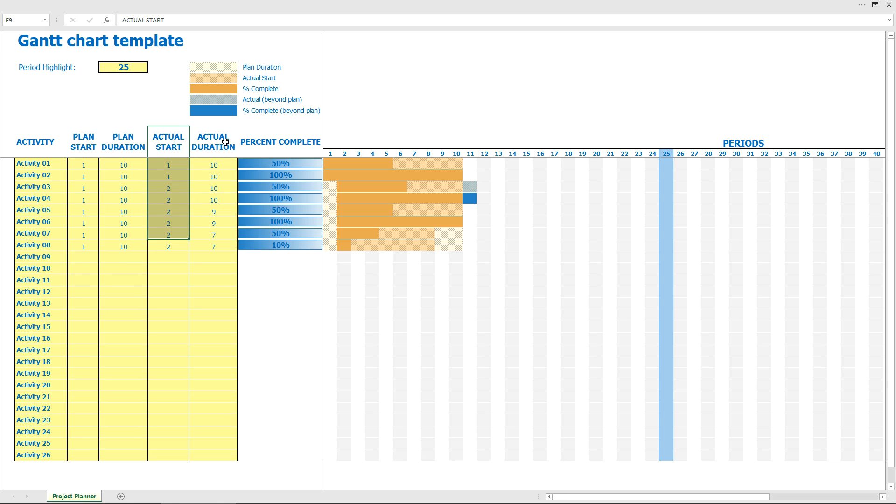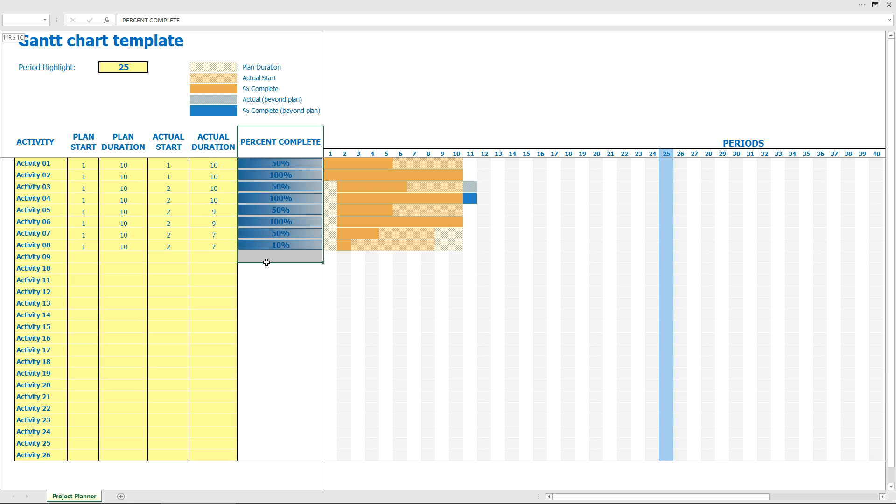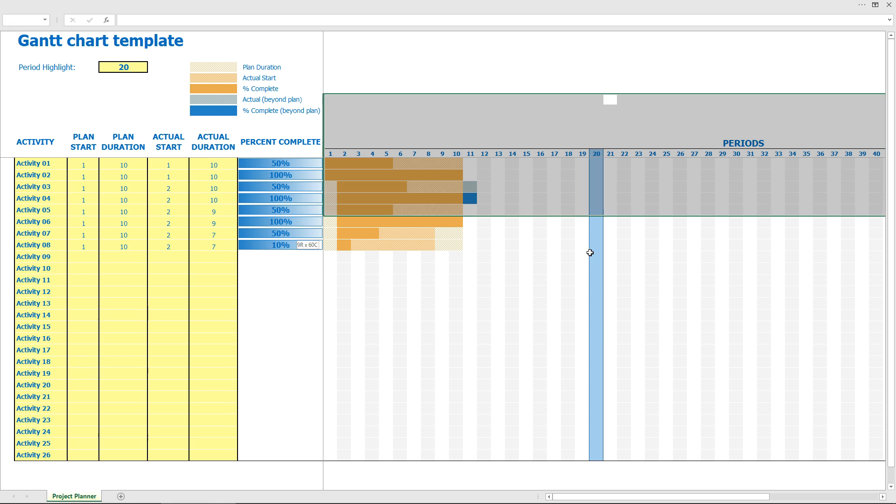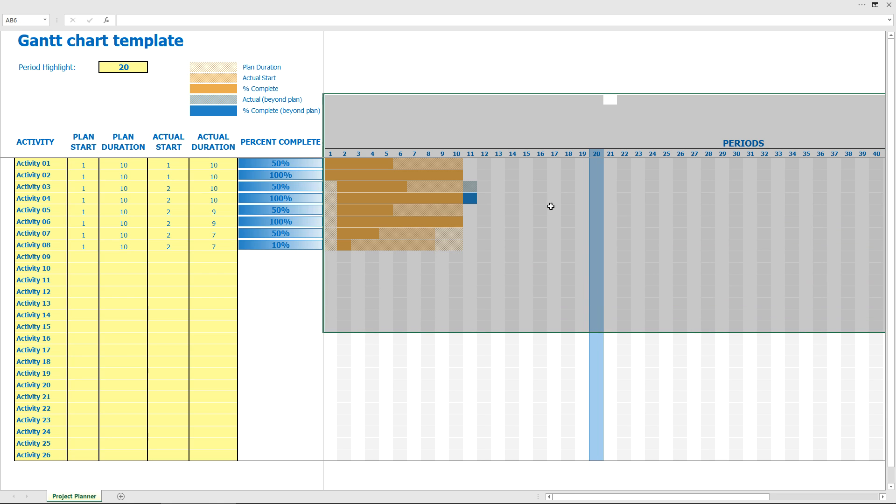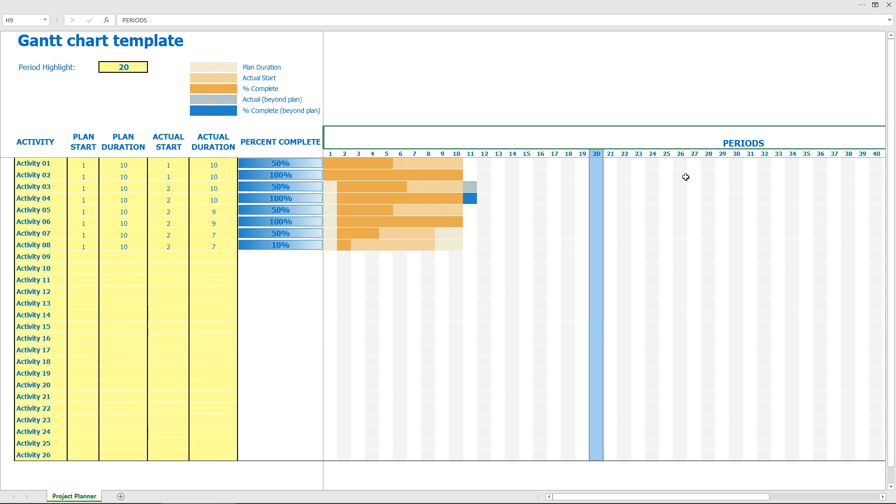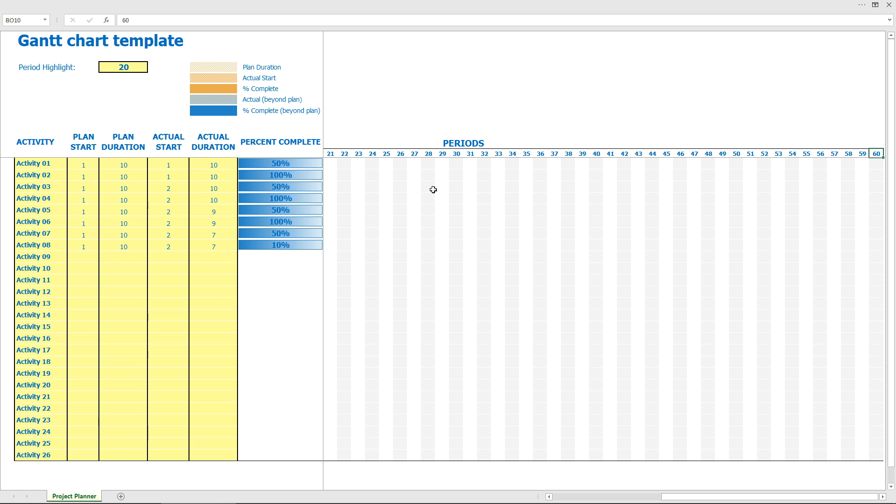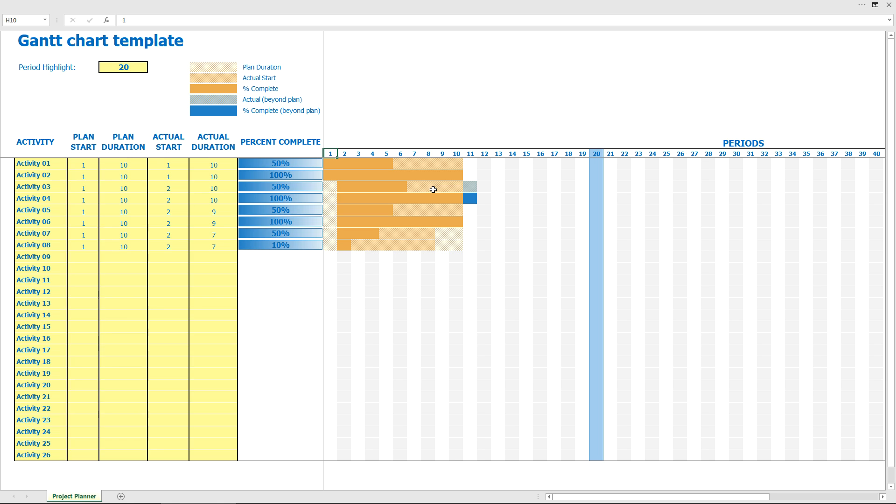This is for the percent complete and period highlight, which works like this. For example, 20 shows you... By the way, you have periods not marked as week or day, so it's up to you to use it as a weekly, daily, or monthly plan. You have up to 60 periods in your hands, so you can adjust this template to your needs.